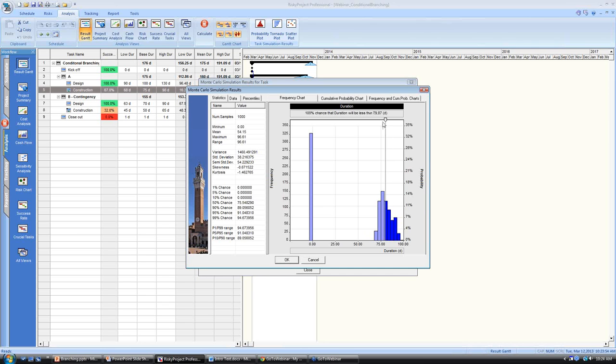We didn't quite make it there, so we went off. Another way to look at it is to look at the data. We can see how many times during the data run, I think we ran 1,000 simulations here, we didn't meet that criteria. It looks to me somewhere around 30, and it's 32% of the time we didn't make it down that path.